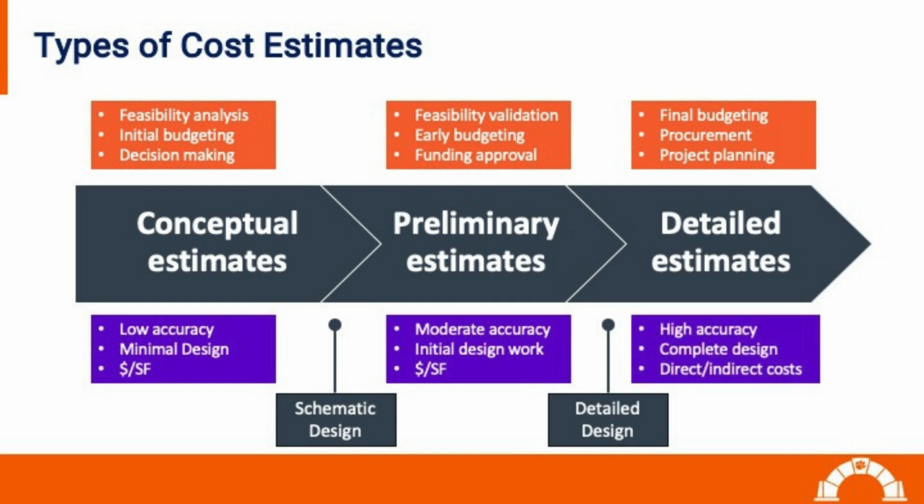Detailed estimates are highly accurate compared to other types of estimates because they rely on a complete design. They involve thorough calculations of direct costs, such as materials, labor, and equipment, as well as indirect overhead costs, including office space, utilities, and administrative staff salaries.